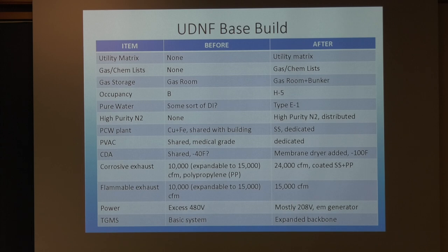Another issue we had, you heard a lot of talk about EMI, is that all the conduits that were feeding the power panels in the back of the base all somehow ran under the room where the beam lithography tool was supposed to go. So what we did, actually, we took all the conduits, and now they run 30 feet above the floor. And you know, the EMI drops like the cube of the distance or so, so things are a lot better.